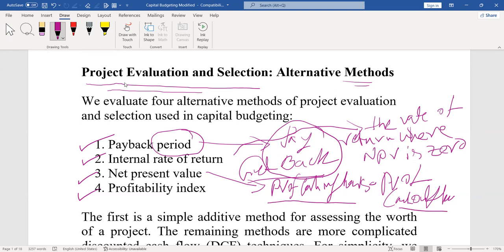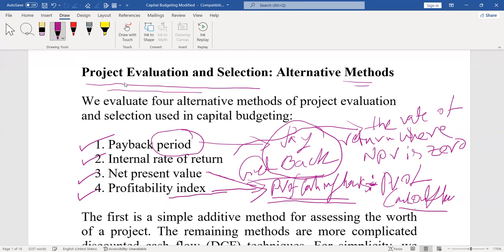For profitability index, just use the formula of net present value with one change: present value of cash inflows divided by present value of cash outflows. In the case of net present value, we calculate it using present value of cash inflows minus present value of cash outflows. The difference is that when calculating profitability index, we divide present value of cash inflows by present value of cash outflows.